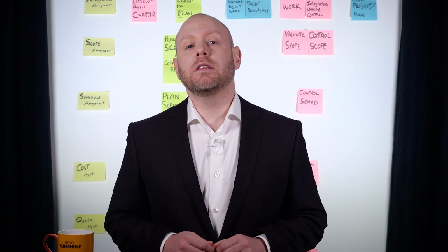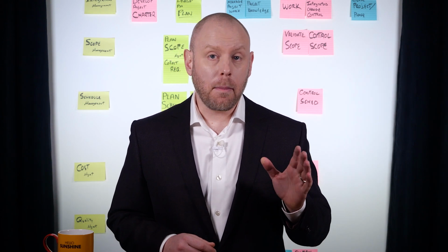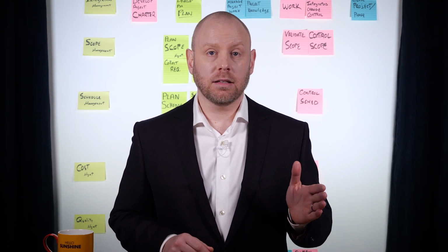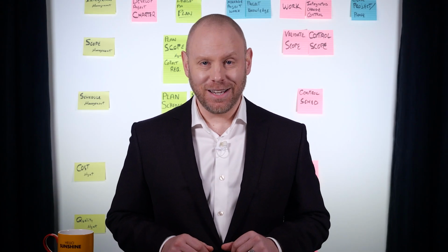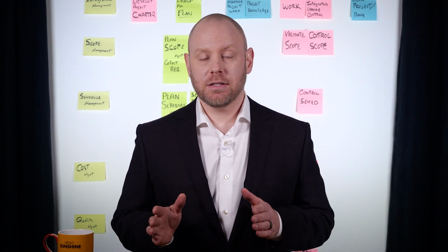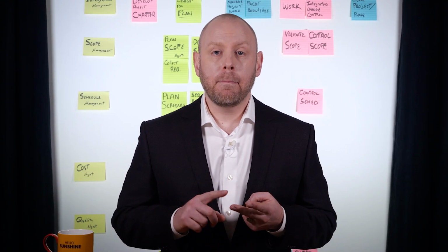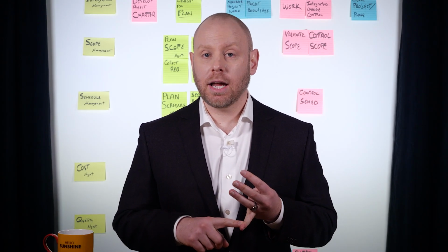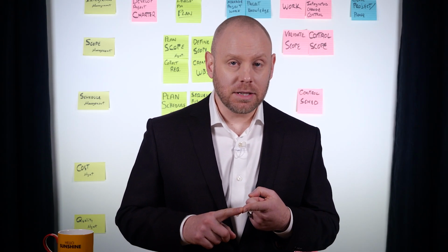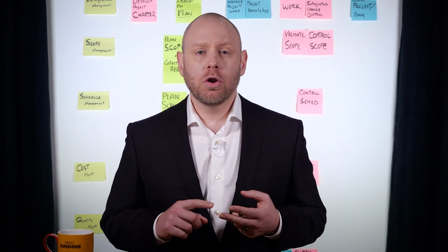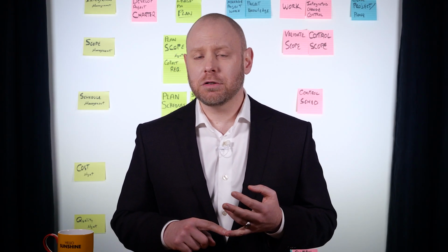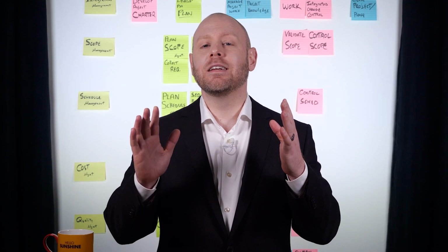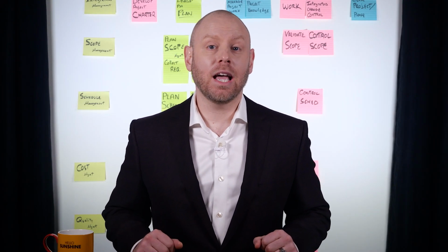To start, we'll need the following inputs: risk management plan, scope baseline, schedule baseline, cost baseline, and some project documents: the assumptions log, basis of estimates, cost estimates, cost forecast, duration estimates, our milestone list, resource requirements, risk register, risk report, schedule forecasts, and our best buds, EEFs and OPAs.